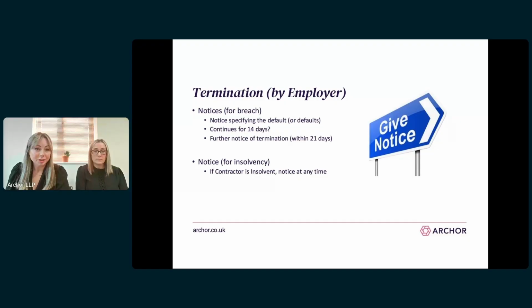If the employer doesn't terminate in this 21-day period, but the contractor repeats a specified default, then the employer can terminate anyway within a reasonable time after such repetition. The position is slightly different for contractor insolvency. If the contractor becomes insolvent, and that falls within the definition of 8.1, then clause 8.5.1 allows the employer to terminate at any time just by giving notice to the contractor. So there's no 14-day period there. That's an immediate termination on insolvency, but you have to serve the notice first.